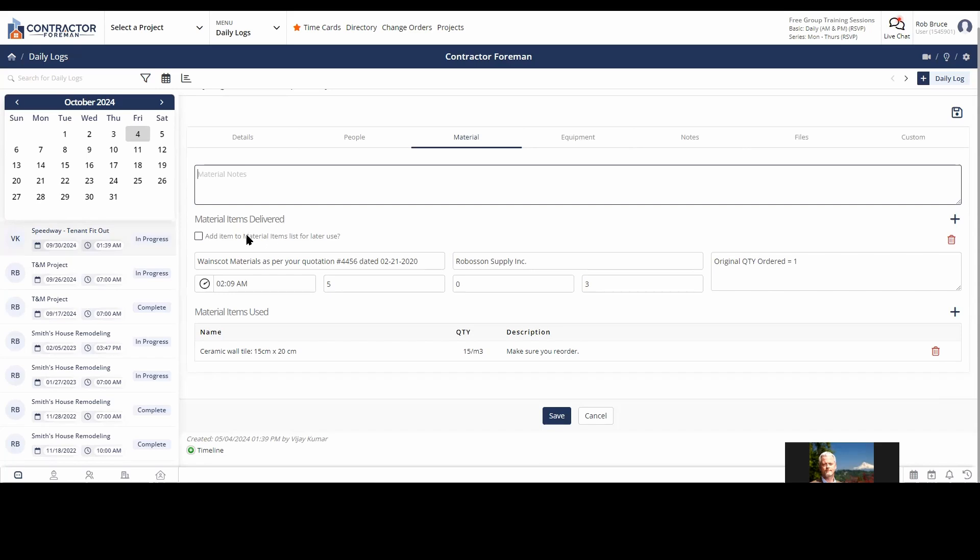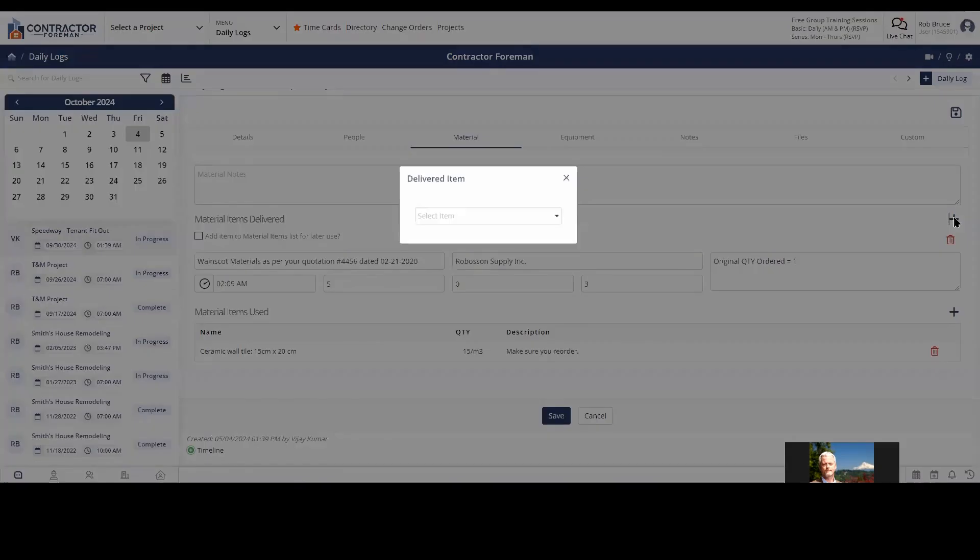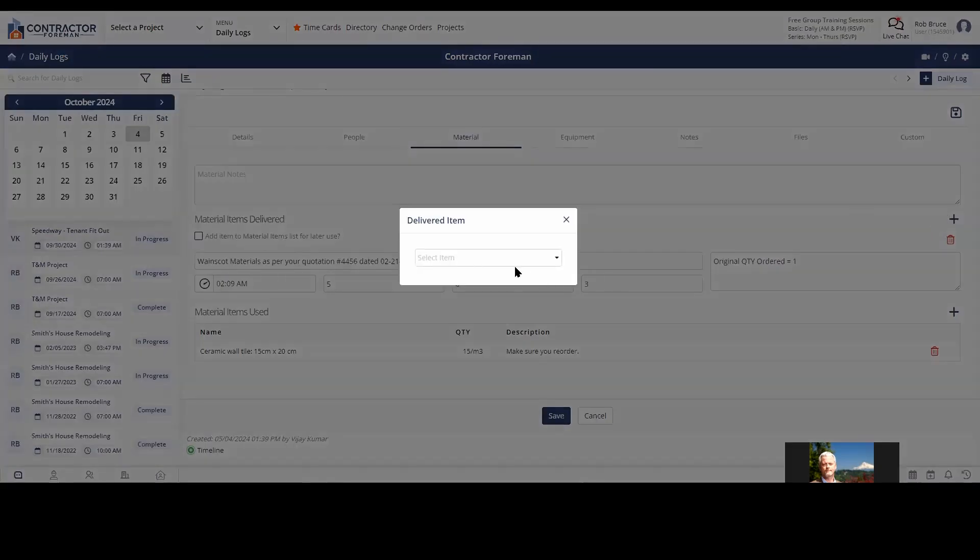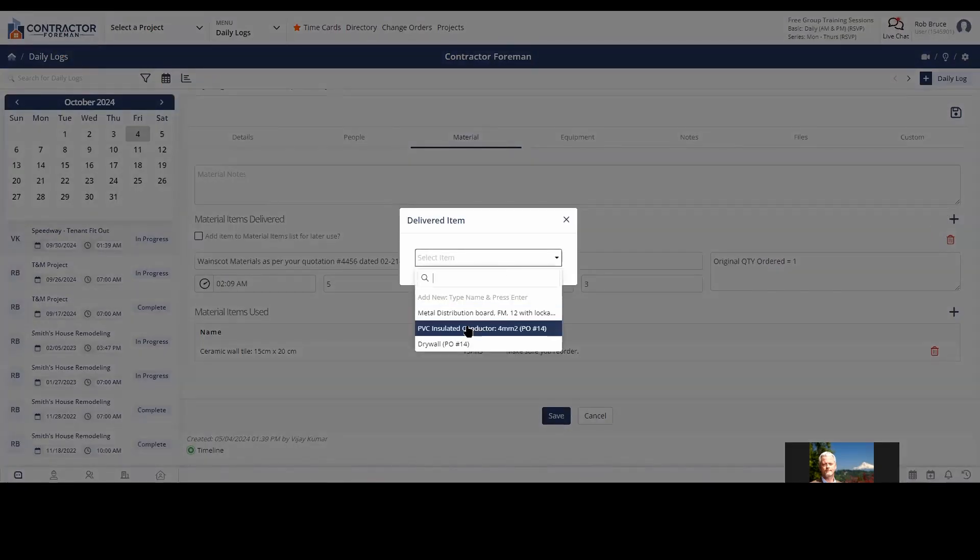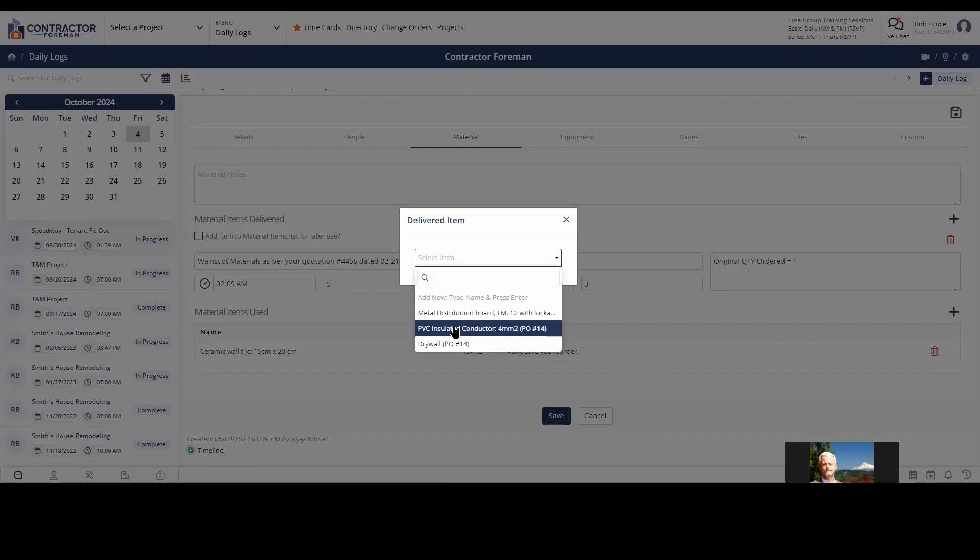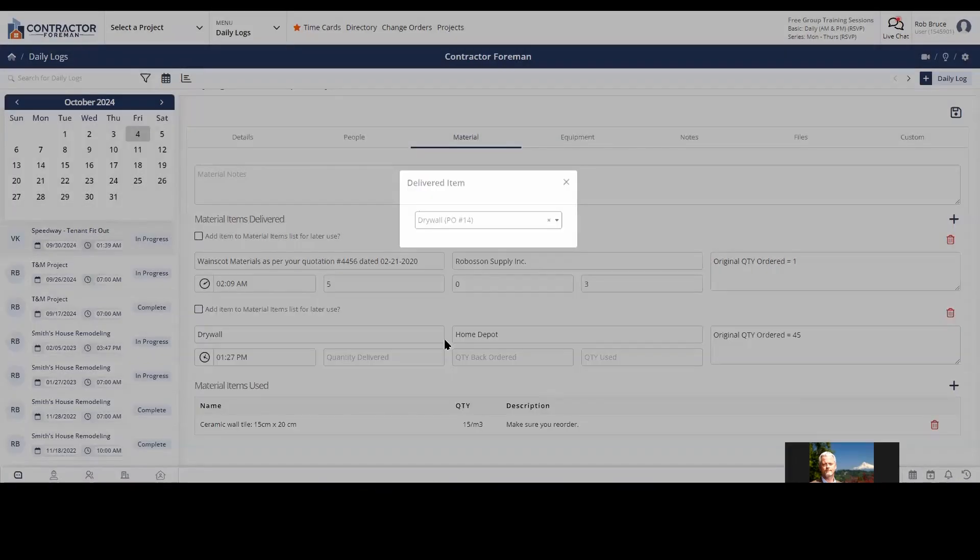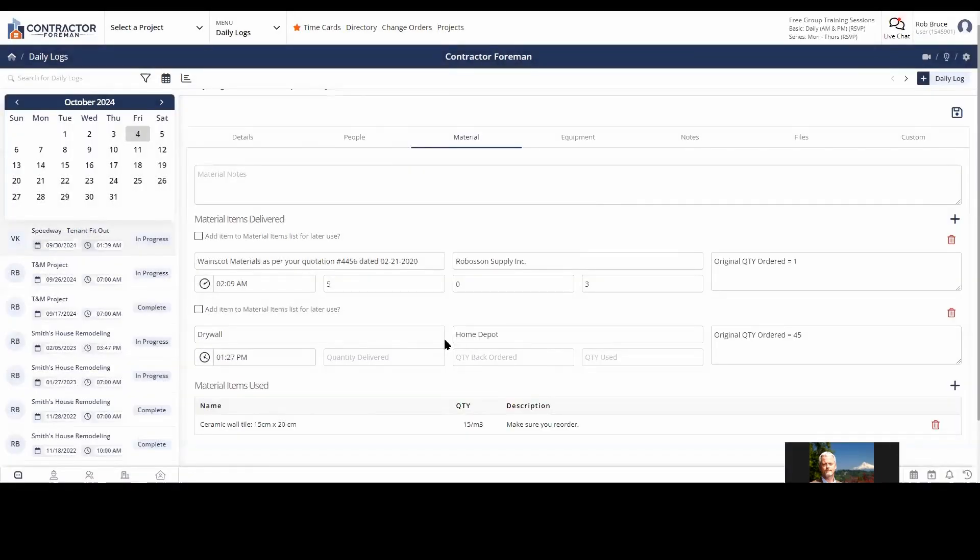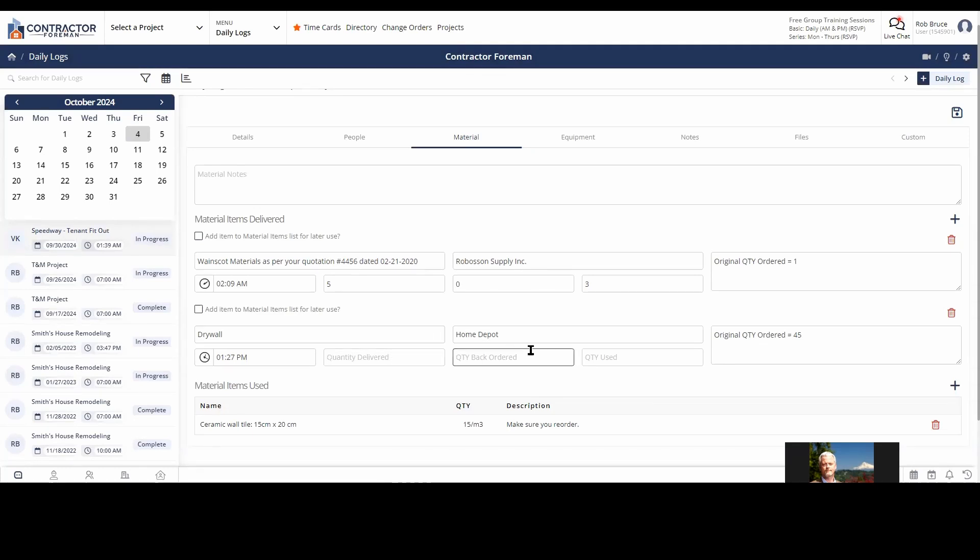Material items delivered. Now what's handy about this is, remember I keep saying over and over, but Contractor Foreman is very automated. It's all tied together. It knows where to send information next for you. So you're not having to do it manually, but in our material items delivered, what I can do is I can select from purchase orders and materials that were on purchase orders. So I can say, well, I got some drywall delivered here and there it is down there. And how much did I get delivered? Was there any back ordered? How much did I use? And again, a note field.